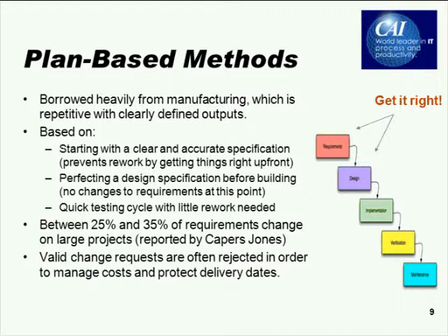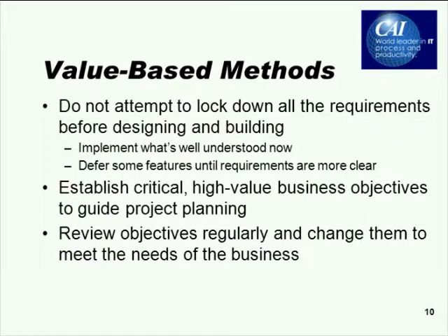With plan-based approaches, teams become very rigid and resistant to change because of pre-existing cost and schedule constraints. Well, that's problematic because there's often a good reason why changes are introduced during a project. Something could be identified by the business as a really good idea, or the team may have learned something through the course of the project that changes their understanding of the original requirements. Those changes are often rejected in order to constrain costs and protect the delivery dates that the team has committed to.